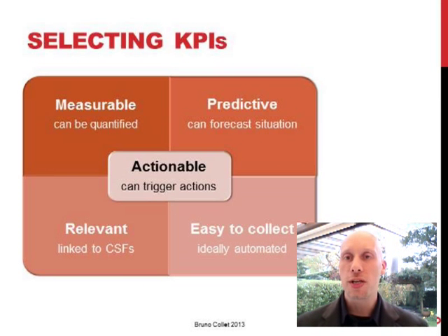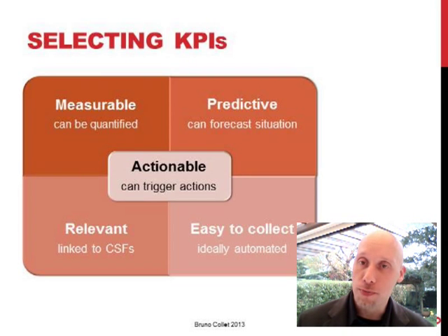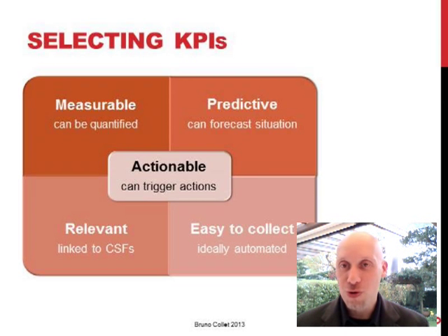The first one is to use as KPIs only what is very visible and easiest to collect compared to the rest, which is one of the reasons time and cost are so popular. Yes, they are important metrics, but one of the reasons they are so widely used is also because compared to most others, also very important metrics, they are comparatively easier to calculate. And the other extreme is that we choose as KPIs something that is reflecting something wonderful made of many different metrics collected in different teams by different people at different times, and it's great on paper. Unfortunately, it's so hard to collect, so costly to collect that it's just not worthwhile.